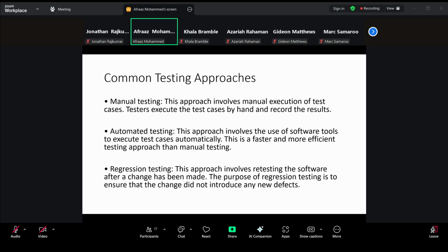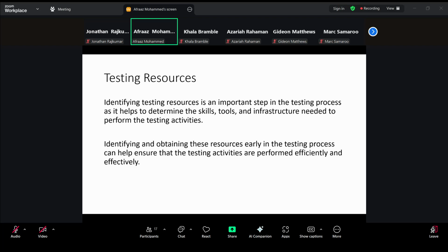So you go back to the development team. They spend a few days fixing and evaluating and fixing. Guess what has to happen? They have to do the testing again, so regression testing. So they're going to take more time, a couple of days again, to do regression testing. And out of that, sometimes some of the things aren't fixed properly. That's one scenario. And another thing is something could be not working that was working. So testing does take a lot of time, right? Don't underestimate it at all.